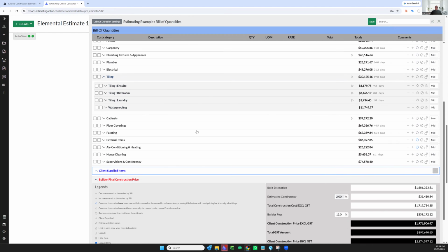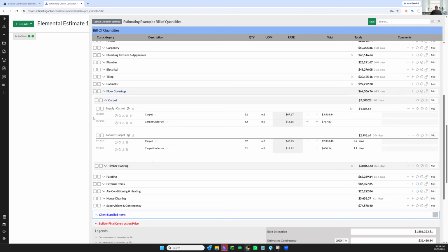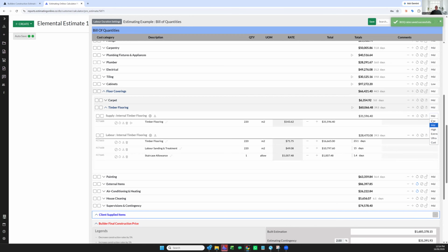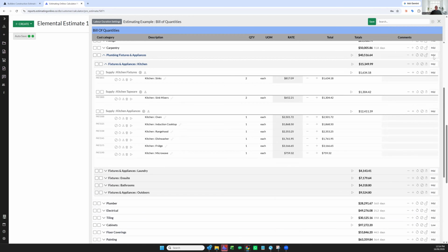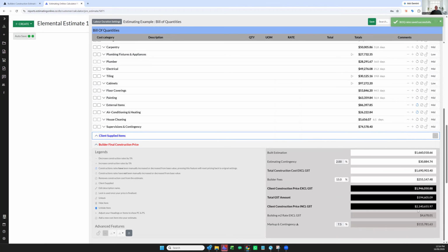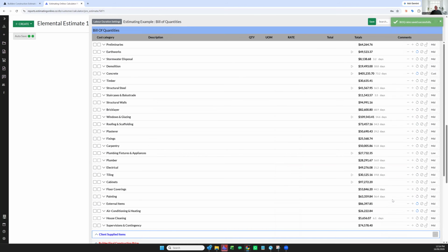We feel sometimes the common mistake that happens inside projects is we design first, we do our selections first, but we forget about costings. This is why we're really passionate about getting the builder involved in early stages so we can control these budgets, so we can control everything to be able to say, hey, your prime cost allowance for these fixtures and fittings is not going to be $40,000. It's $27,000 if you want to achieve a number closer to $2 million.